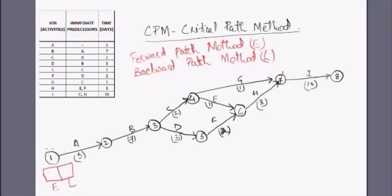The nodes are instantaneous moments of time — they are events. At the first node we start at time zero. Moving forward to node 2, we complete activity A on day 5, so the earliest occurrence at node 2 is 5. Moving to node 3, it is 5 days plus 7 days for activity B, giving day 12. On the twelfth day we would have completed activity B and be ready to take up activities C and D.